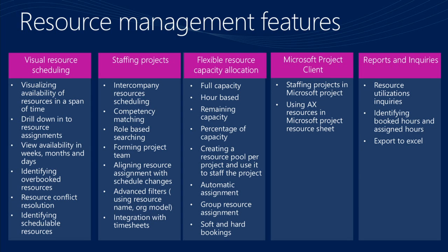We have also introduced the concept of project teams. Now you can form a project team by identifying qualified people that you want in the form of a role and skills and competencies that you need. Form your project team at a high level, or as we call it, top-down staffing, and then you do your detailed scheduling. In many cases, you want to secure your resources first, and then you do your detailed work scheduling, right? You want to secure specific resources. We have introduced that as well.